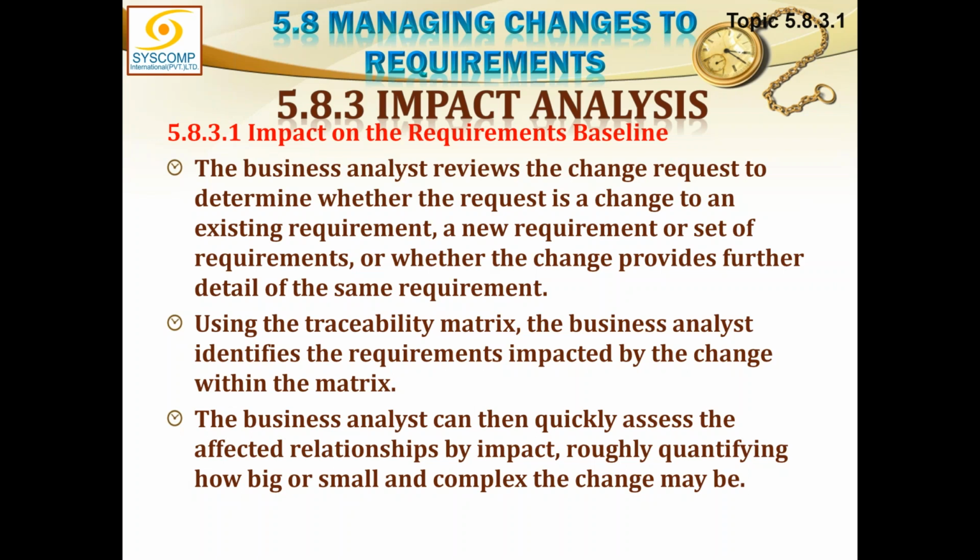The business analyst reviews the change request to determine whether the request is a change to an existing requirement, a new requirement or a set of requirements, or whether the change provides further detail of the same requirement. Using the traceability matrix, the business analyst identifies the requirements impacted by the change within the matrix. The business analyst can then quickly assess the affected relationships by impact, roughly quantifying how big or small and complex the change may be.